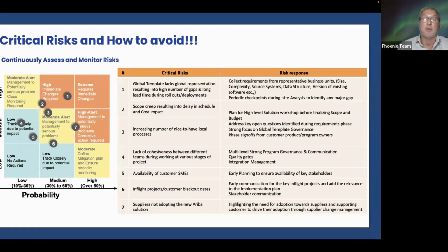Now the global template should be done at the end of design phase too, so I wouldn't say prepare phase, I would say design phase for both of those. But at each gate, prepare, design, build, test, and run, you need to have sign off. And once you have that signed off, unless there's some national calamity that we didn't catch, then there's no changes. Does that mean there'll never be changes? Absolutely not. There will be changes, but those aren't part of the process today. Those are part of phase two. I hope that answered your question.